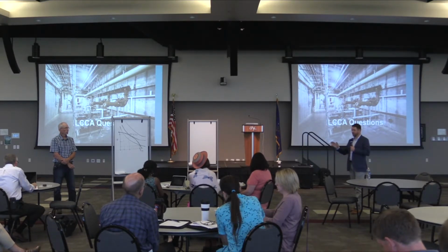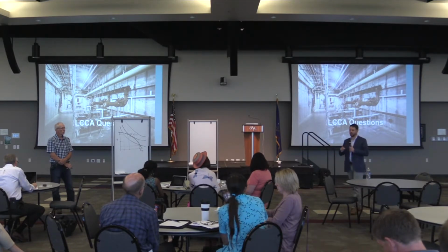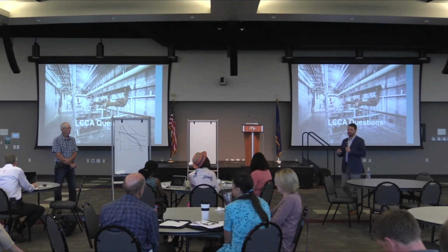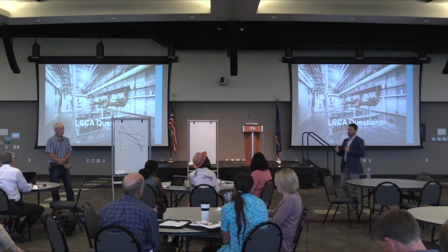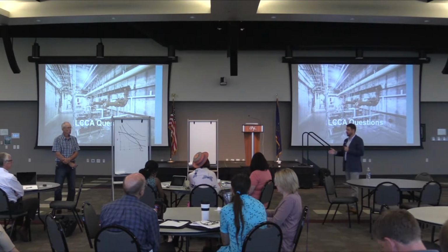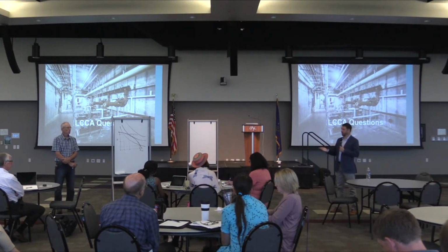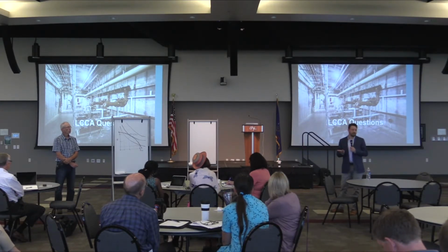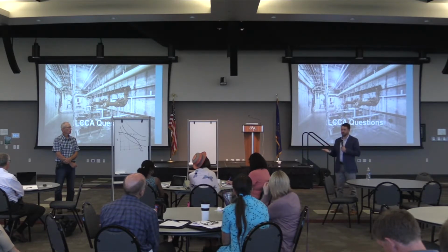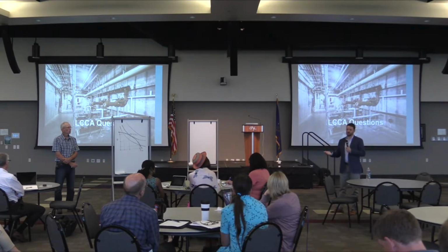The one thing I would say, getting back to Jeff's question about O&M, though, it doesn't mean that a rate study can't help inform what you're doing here. Rates can be a basis for helping to establish what that O&M could be. For example, as I talked about before, like a regional water district, if you're connecting into them and you're paying a rate, that rate has an O&M built into it. So why not use that information to back into an O&M estimate?